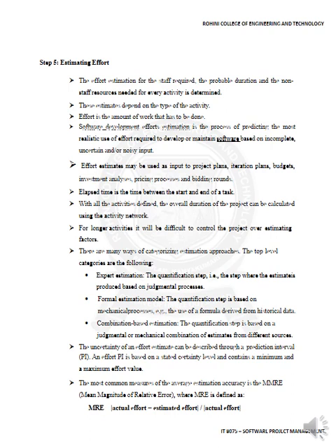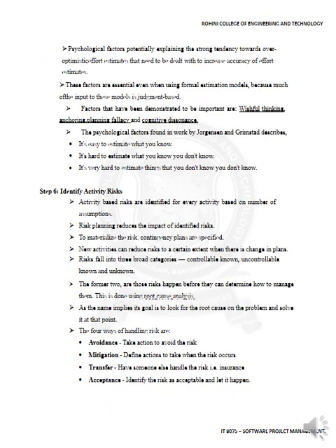Estimating effort. The software development effort estimation is a process of predicting the most realistic use of the effort to develop or maintain software based on incomplete or uncertain noisy input. So MRE will be defined as actual effort minus estimated effort divided by actual effort.